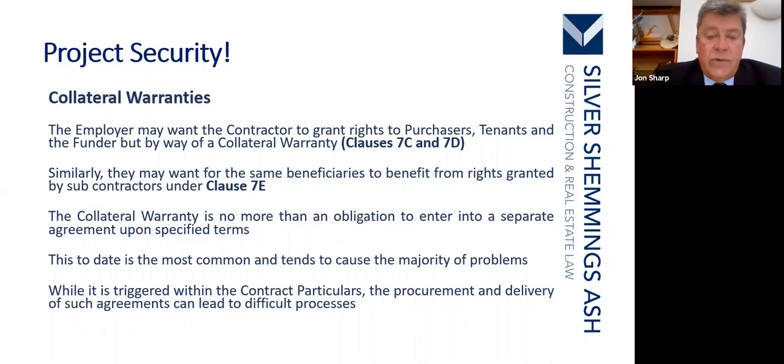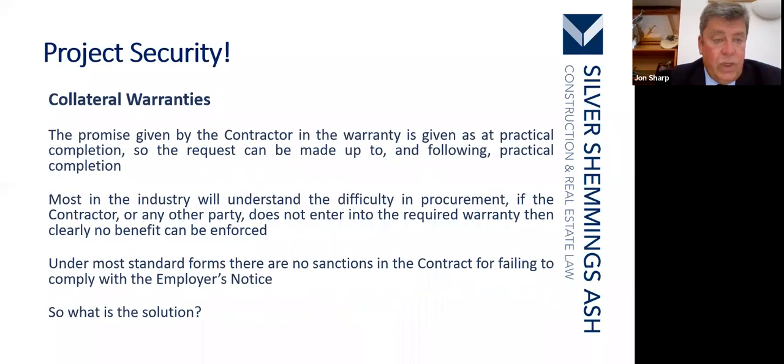This to date is the most common and tends to cause the majority of problems. Whilst it's triggered within the contract particulars, the procurement and delivery of such agreements can lead to very difficult processes. The promise given by the contractor in the warranty is given as at practical completion.